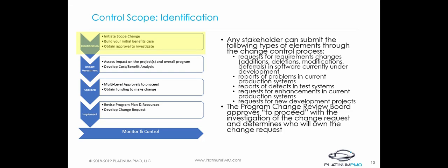It is really good at this time to start getting your ducks in a row and start building your benefits case for the requested change. You see, there is a program cost in the next step of the process, the impact assessment, because you're going to have to take people off of already predefined deliverables and work packages and ask them to work on something else that is not part of their resource capacity. Right there, you are putting your work packages and timelines at risk.